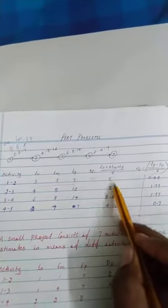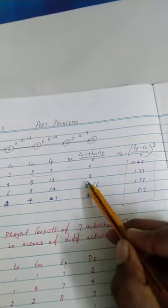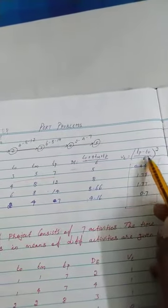T0 plus 4TM plus TP by 6: 5, 8, 8.66, and 4.16. The variance we have in the formula. Substitute in the above, below the values in this particular formula, you will get this variance answer.